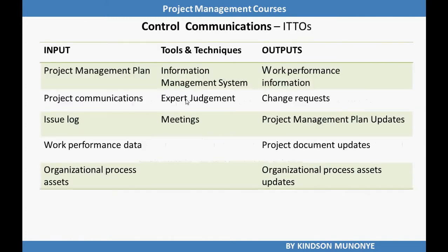Alright, let's now look at the ITTOs of the control communications process. I have listed the ITTOs in the table there. We have the project management plan as the first input, the project communications. Remember, the project communications is the output of the manage communications process, and the project management plan for sure contains the communications management plan, which is the output of the plan communications management process.